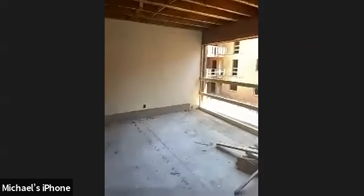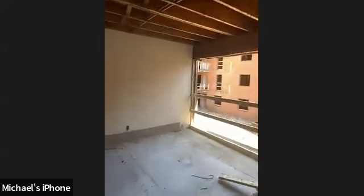So on the floor, the subfloor, are we going to put gypcrete down? What are we doing for sound transmission between the floors, or is there gypcrete already there? No, it's MDF board here now. The MDF board gets ripped up and new 3/4 inch plywood goes down. Okay. Sound, I would insulate from down below. Sound insulation. It does not call for gypcrete.